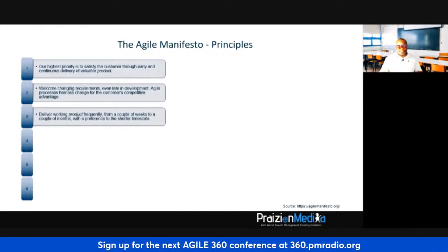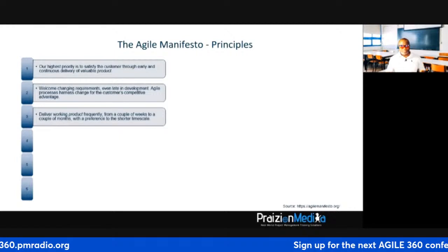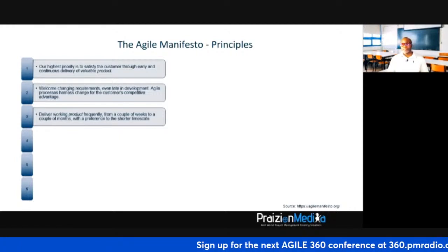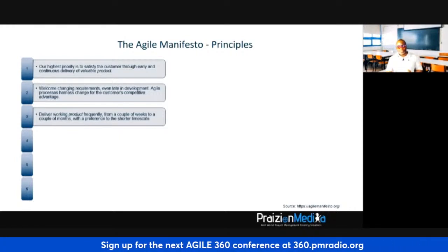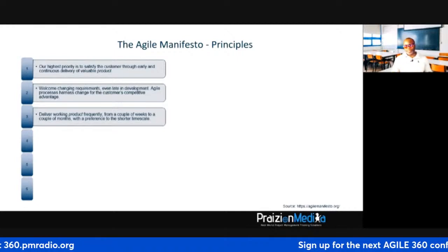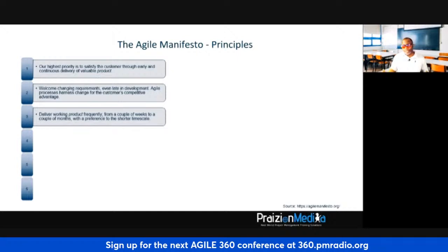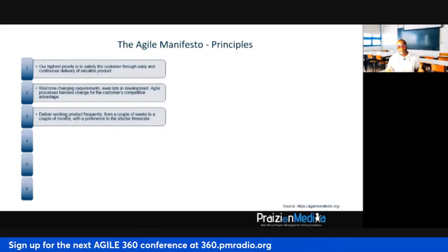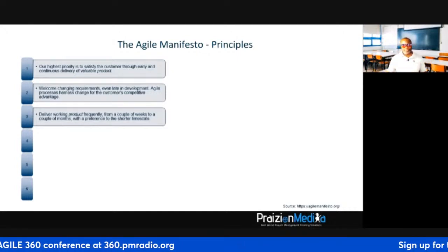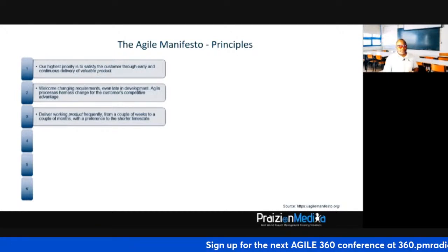When you're working in an agile environment, you got to make sure that you deliver frequently so that you can catch any errors as early as possible. Delivering frequently is actually a risk coping mechanism. Delivering in tiny little batches, there's a likelihood that you'll be able to catch anything that's off, versus in predictive, where you deliver at the end and there's a big bang, and what happens? You realize this isn't what we wanted. So in Agile, we have a lot of risk coping mechanisms, and frequent delivery is one of them.